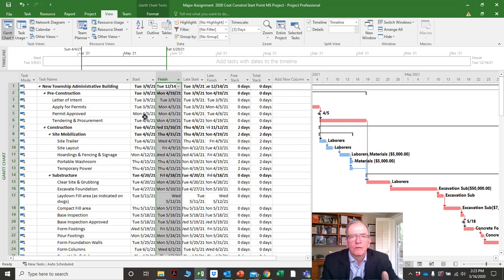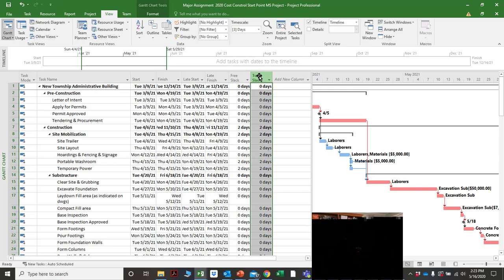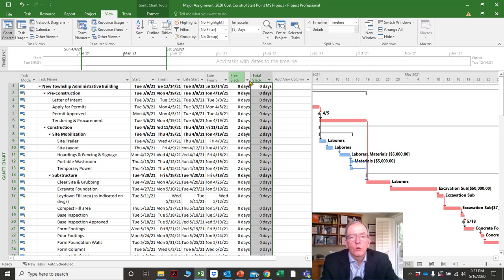If you make a mistake and don't catch it, it could literally throw your project off months — or hundreds of thousands of dollars if you're doing a cost-loaded schedule. But if you put it in right, it does all these calculations for you.